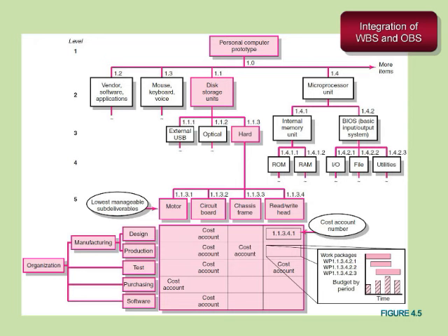The 4 work packages for the circuit board are the design group, the production group, the testing group, and the software group. Some of them are manufacturing, some of them might be in engineering, as it looks like the way the organization is structured. And so that's how you read that. And so you can see the challenges of a hybrid organization where we've got to actually figure out within our structure how this work's going to get done. Probably one of the biggest causes of project delays and project failures is integrating this work within the organizational structure.